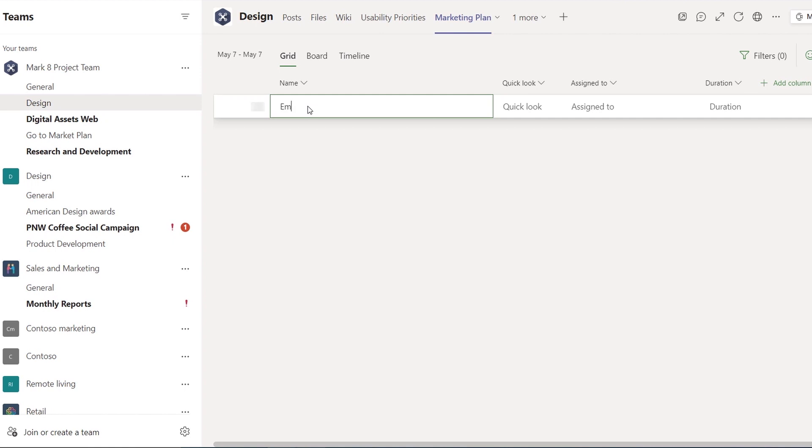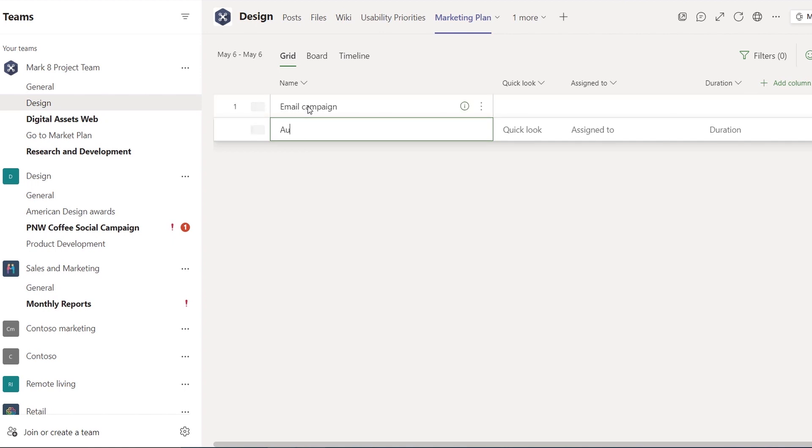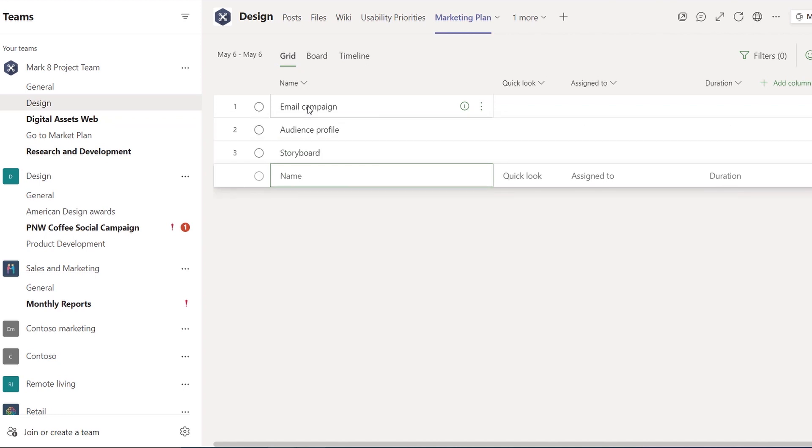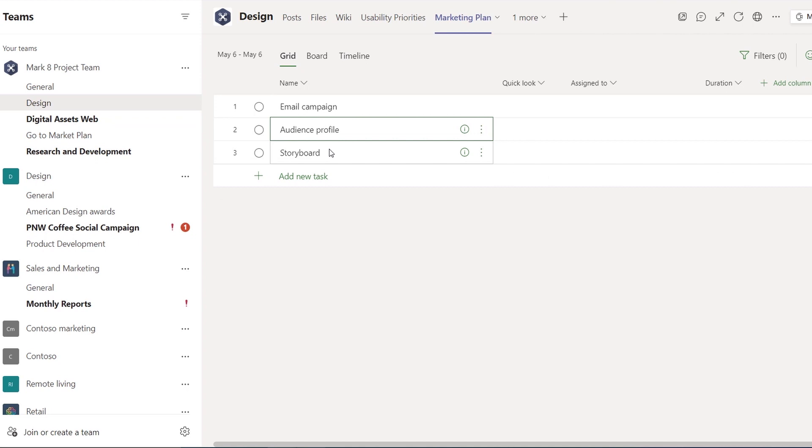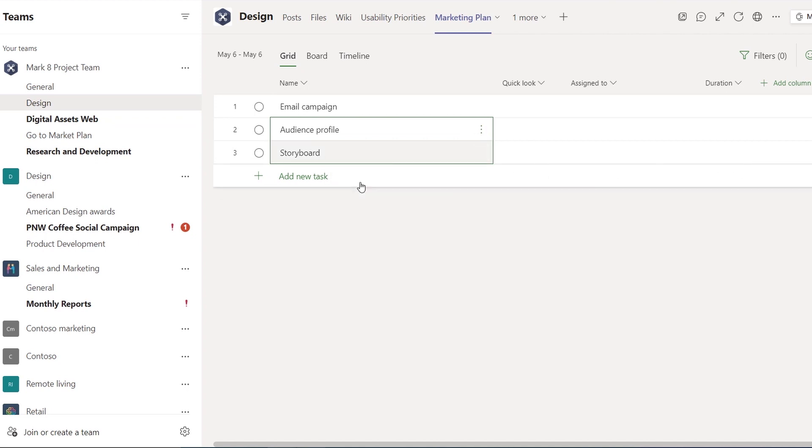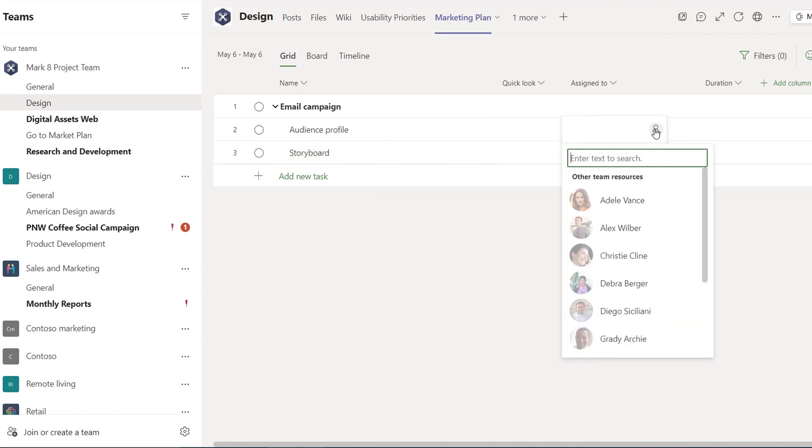From here we can start adding tasks. I'll add a few: Email Campaign, Audience Profile, and Storyboard. From here I can also create a work breakdown structure. In this case, tasks two and three will become subtasks of our Email Campaign. Now I can begin assigning people—I'll assign Adele for now.